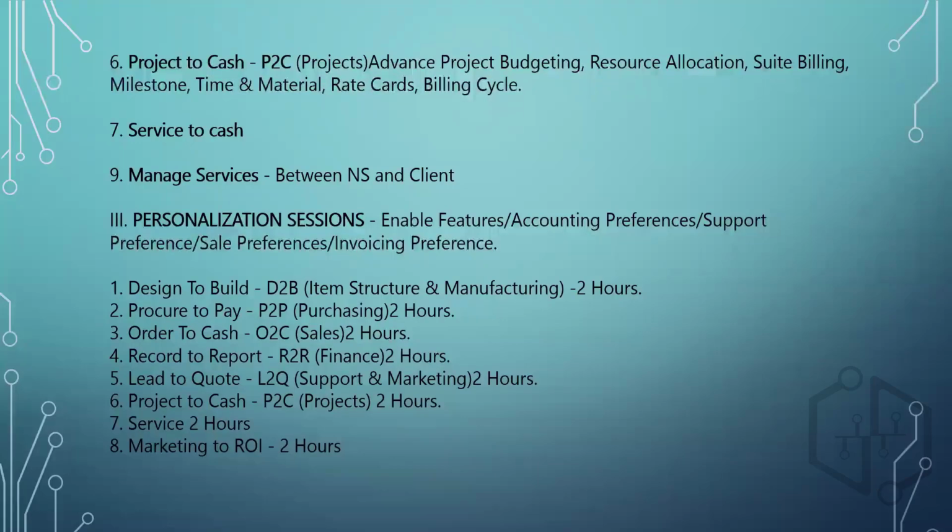Then there is milestone billing. Milestone is nothing but certain activities which are defined. Let us say we were talking about the NetSuite implementation itself, the enable, engage, convert phases. Each phase is defined as a milestone, and after the end of each milestone, the customer invoicing is done. And then we have the rate cards and billing cycles.